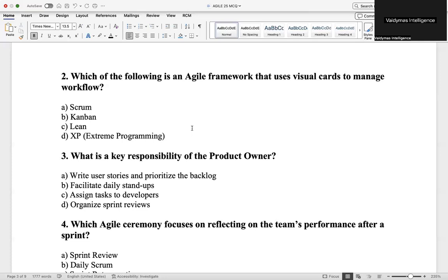You remember that if you're pulling, that means once you put cars on a chain, until the car in front of me is finished, I can't move over to the next car. So that means I'm pulling the process. The process is coming towards me and I'm pulling it, finishing it and passing it on to the next person. So that's pull. Anywhere you have pull, you will always have continuous flow because you are ensuring that you finish an execution before you move to the next one. Then the next thing for Lean is something they call Kaizen spirit. That's the spirit of continuous improvement.